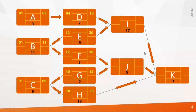Now at the third level, you might be confused about picking the starting date of activity I, since it waits for two activities — D and E — to complete. Which date do you take, 20 or 10? The answer is 20, because you must pick the longest duration and add 1, making 21 the starting date of activity I. Always take the greater value and add 1. The same applies to activity G.